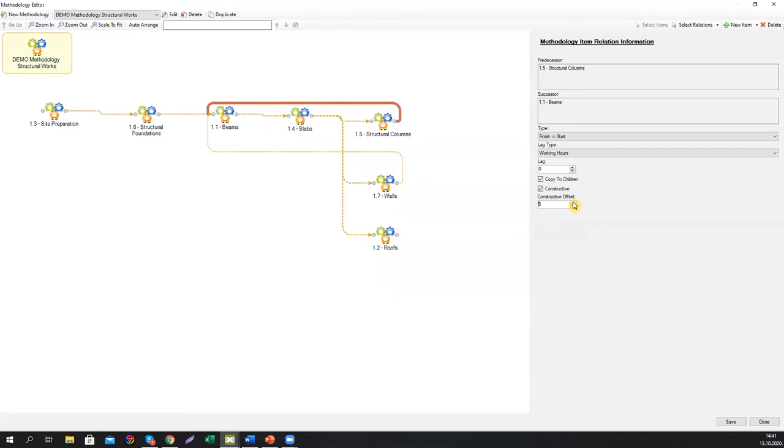But if something happened and your works are stopped in the construction on that floor for the concrete works, the algorithm will only wait for 5 weeks and anyway start with the facade execution, and then you're going to have a problem. In this way, you're going to always keep distance between these floors. So we have to return this to one floor in this example, because this is all we need. If we put more than one, we're going to get an illogical sequence where we build 2 stories high columns, and then we start building beams between them. So we'll need only one level of offset here.